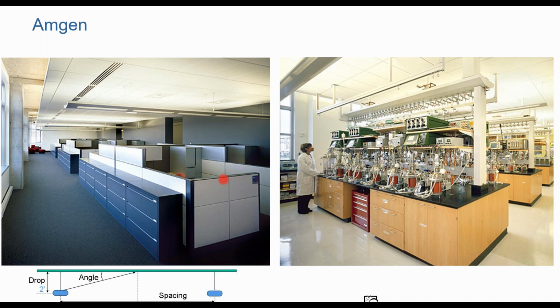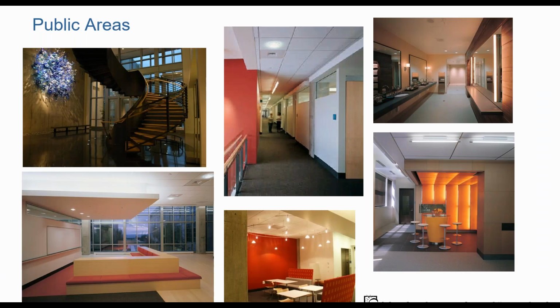We proved both of these things out actually at the old lighting design lab up on Capitol Hill when we did mock-ups for both. So a big part of stakeholder engagement for you guys may in fact be things like mock-ups. Show people what's going to happen. We did similar kinds of things for all of the public areas. You'll see lots of different lighting styles here, and all of it, or almost all of it, is controlled by dimming control systems so that we could modulate the amount of energy and the amount of light we were using.